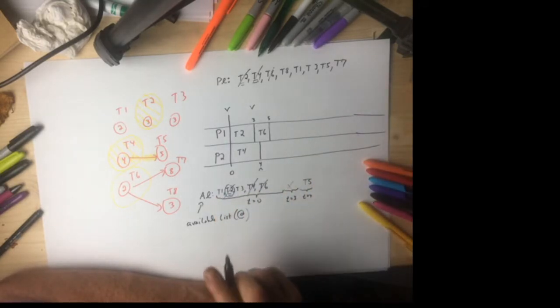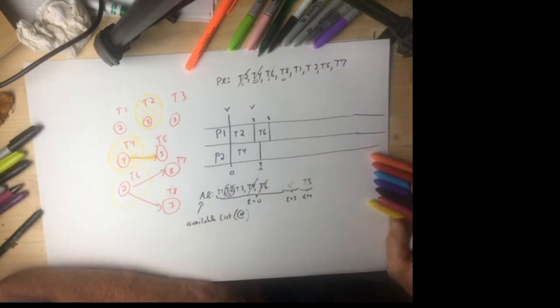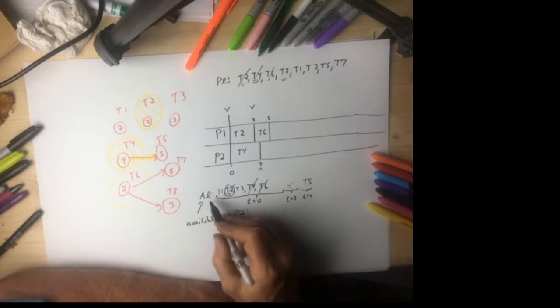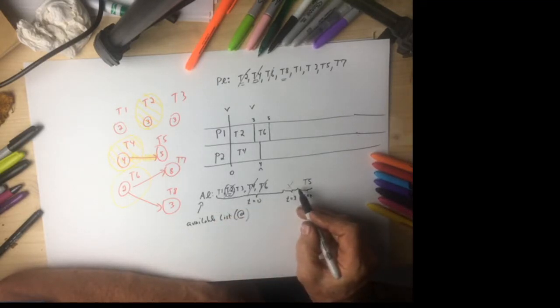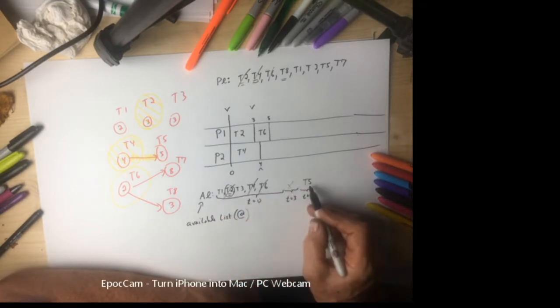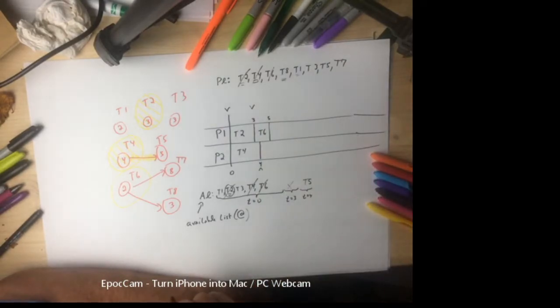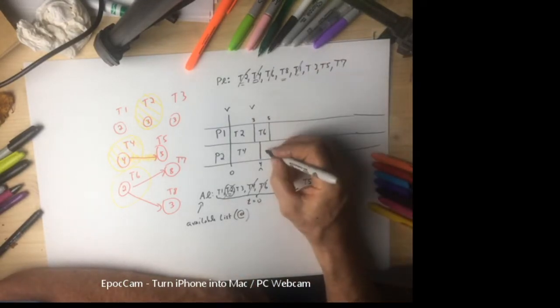So, one person at time equals 4, and 1, 2, 3 jobs, I have to use my priority list. Now, this is the first time my priority list is not going to use one of the front ends. It can't. T8 is not available. So now, amongst 1, 3, and 5, which is the most important? T1 is the most important. So we're going to put it in.